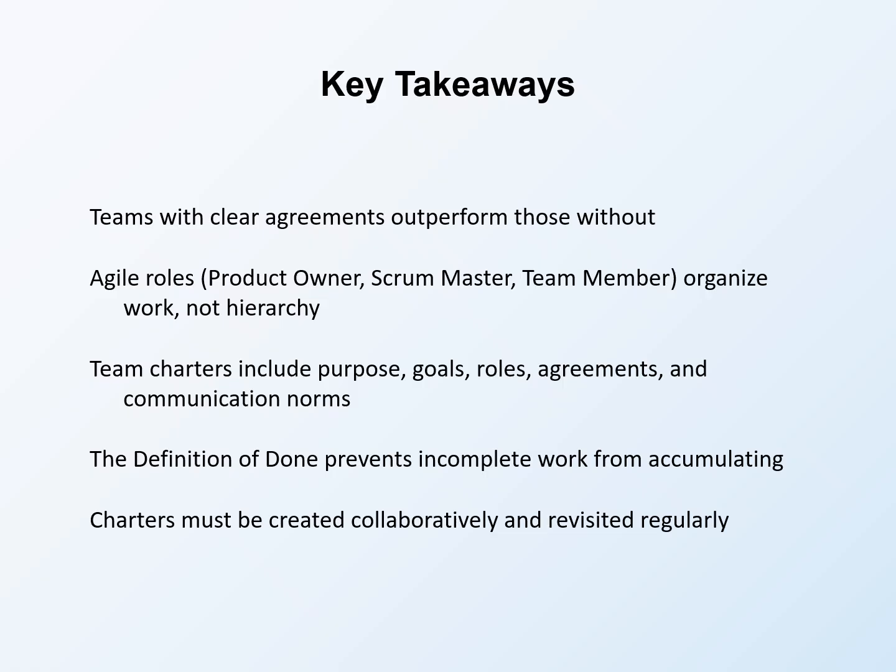The definition of done is particularly powerful. It prevents the accumulation of almost done work that never quite gets finished. And critically, charters must be created collaboratively and revisited regularly. The document is a living agreement, not a historical artifact.